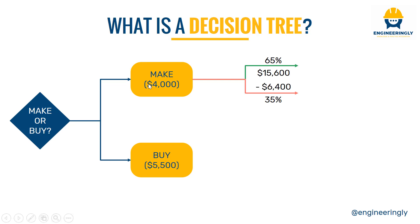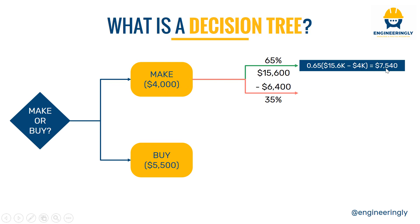Now we calculate the net path value for the make option. We multiply 65% by the difference between the revenue and the initial investment: 65% × (15,600 − 4,000). This results in seven thousand five hundred and forty dollars. For the failure case, the result is minus three thousand six hundred and forty dollars.